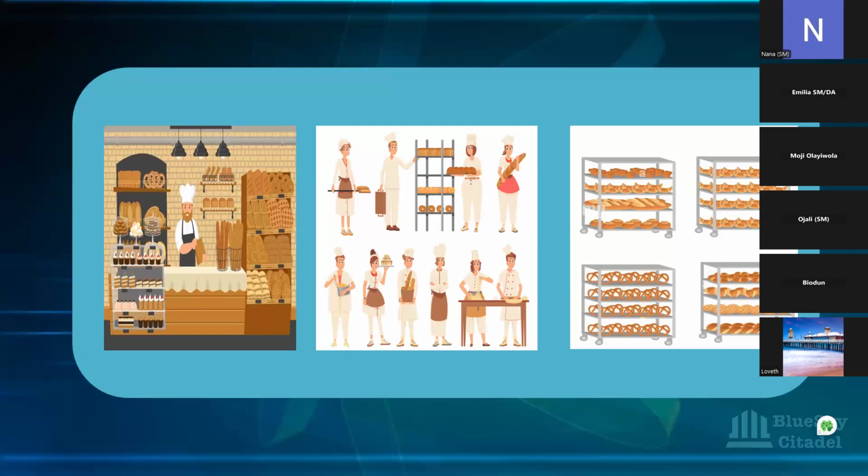Okay, so those are some of the things that we need to put in place. And guess what? Planning capacity as a Scrum Master. For Scrum Masters, you plan the team's capacity. For Agile Delivery Manager, you go beyond. So while the Scrum Master is planning the Scrum team's capacity, you are looking into the capacity of other teams that might need to work with the Scrum team in order for them to meet what needs to be done.